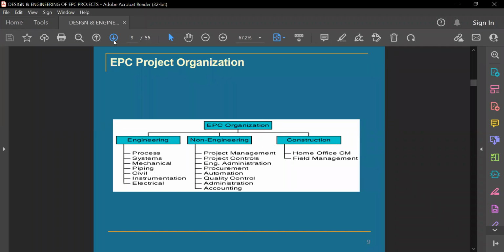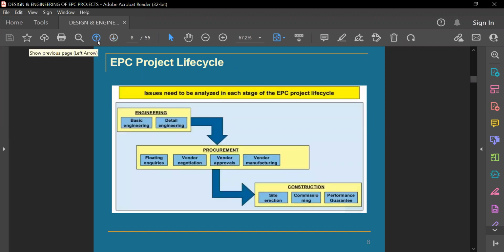So we have to share their CVs, and then maybe they will discuss with them their understanding and everything. The lead engineer especially will be involved in this one, and then they will take their understanding. They will understand that okay, the EPC contractor knows what we want, and that starts with the kickoff meeting, and the project schedule starts with that one.